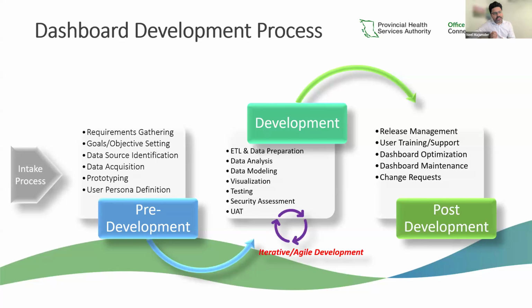We have a dashboard intake process where we do the needs assessment: do we really need a dashboard, or do we just need some flat files of data for the end user? Once this passes through the intake process, in the pre-development phase, we spend time understanding the key goals and objectives of the dashboard and the key requirements. We identify some of the KPIs and metrics, which is step one in the approach that I outlined.